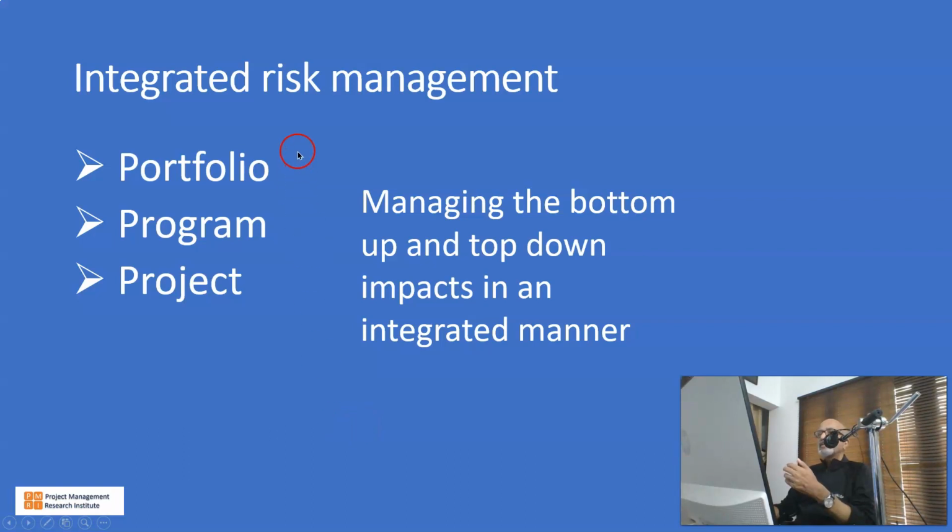Then comes the integrated risk management. So risk can happen at a work package level, and then it will result in the overall project risk. And if that project is part of a program, it will have an overall impact on the program's risk. And if that program or the project is part of a portfolio, this can impact at the portfolio level as well.